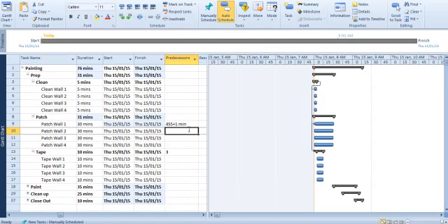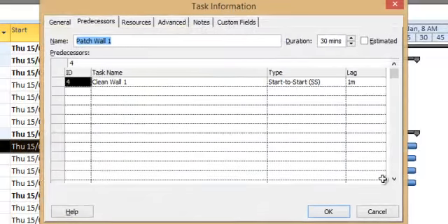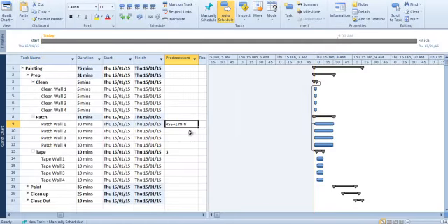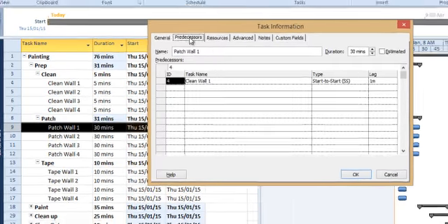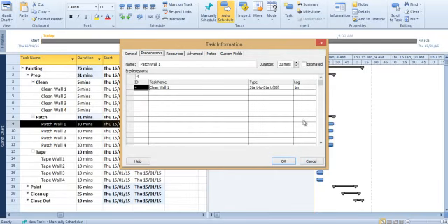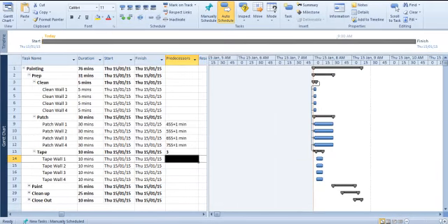If you wanted to do this another way, you could, instead of using this screen, you could just do the shorthand. You could go, it needs task 4 as a predecessor. I'm going to put the relationship as start to start, and I'm going to add 1 minute of lag. And Project understands that as a shorthand. If you don't want to memorize stuff, just double click here, head to the predecessors tab, and use these controls here. You'll get the same effect.